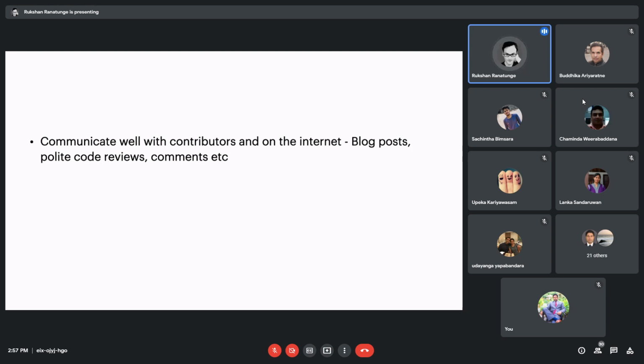Previously, the default login page was for the older system, and they had to go to the newer system by clicking the link. Once they gradually got used to the newer system, we completely pulled the plug and decided to use the newer system as the default system.